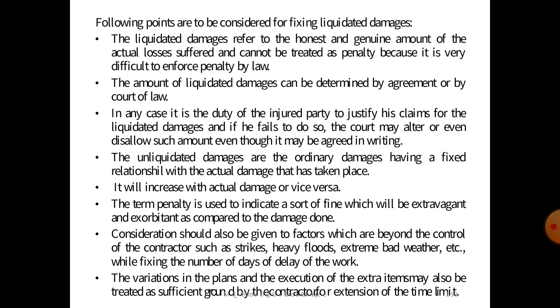So here is how to fix the liquidated damages. Some points are given. First, liquidated damages refer to an honest and genuine amount of the actual loss suffered and cannot be treated as a penalty, because it is very difficult to enforce a penalty by law.